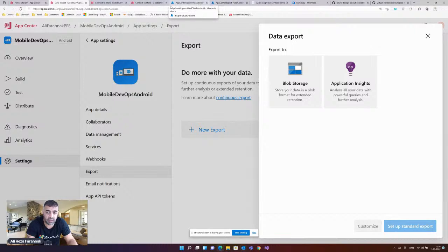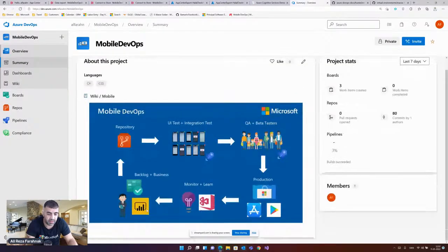And then finally, when an exception happens, the project manager, or program manager in this case, has to plan it in the next iteration, right? And then you come back. The program manager takes the decision on what to spend the product team's time on for the next iteration. So this can be like a release cycle, or it can also be a weekly sprint. But it depends on how often you release, right? Of course, the more often you release, the faster you can recover from that.